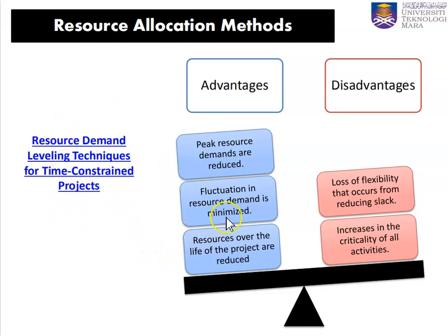So what are the advantages and disadvantages? The advantages of this resource leveling is that the peak resource demands are reduced. Okay, the fluctuation in resource demand is minimized. Resources over the life of the projects are reduced. Okay, but the disadvantage is that we lose flexibility that occurs from reducing the slack, increases in the criticality of all activities.